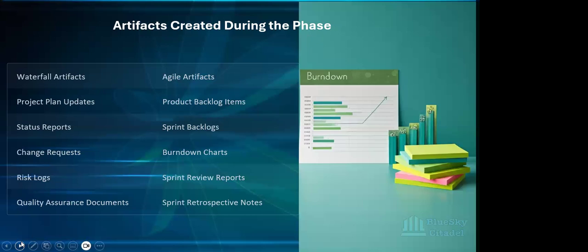Then you've got your sprint backlogs. Each sprint, so your 1, 2, or 4 week sprint, you have specific PBIs, which are descriptions of the work and the feature that is going to be carried out. That's where you would have your acceptance criteria, the description and information, and also the wireframe. So your sprint backlogs will be determined each sprint depending on what the goal was. You have specific sprint backlogs for that.